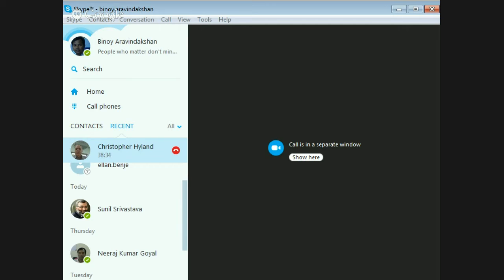Now, what have we got here? Again, we've got the S-curve. Does anybody think that looks like an S-curve? Perhaps it did originally, which was this blue line. And here the actual progress was well in advance of that, in part because they got some of their design deliverables out the door very quickly, and in part because they got all their rails shipped in one big batch from Japan rather than 3 shiploads, because that was the economic way of doing it.